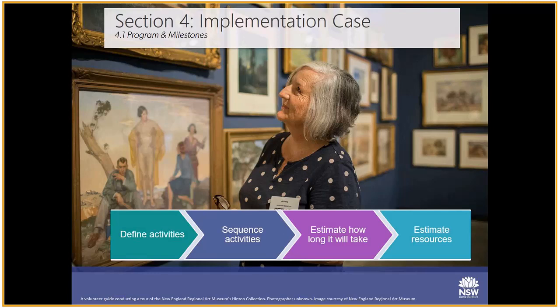It would be preferable to include costs of the milestones in the table, so feel free to add another column here. The estimated costs should correspond to the timing of costs in your budget. Ensure these milestones are as accurate as possible, as these may be used to govern payments received if you've been successful.